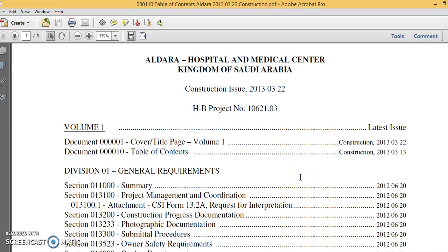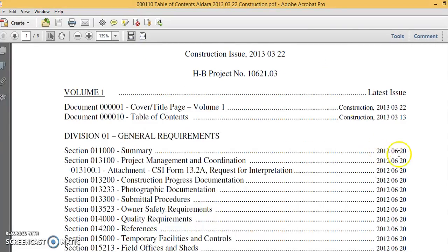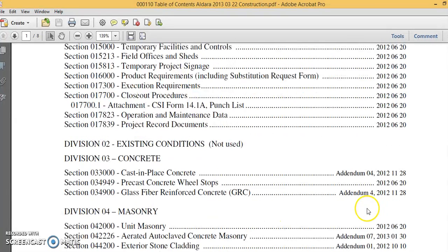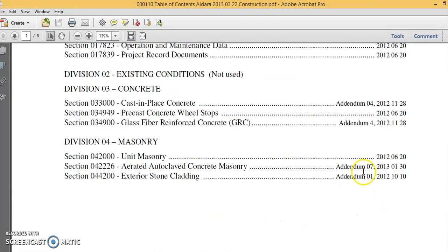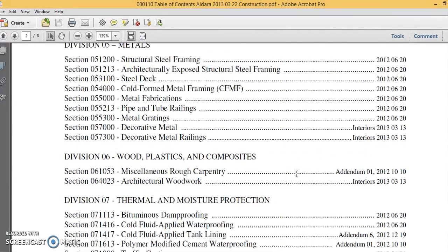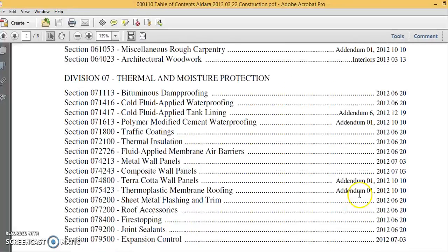Now I will show you examples of certain addendum in certain specification of projects we are working on. This is for educational purpose. This is Aldara Hospital. We are not going to show the specification, only the table of content. I will show you here section 03, there is addendum 04, section 03 also there is addendum, addendum 7, addendum 1, section 4 and so on. It's shown clearly. There are changes that have occurred here between the handing over of the bidding documents and the bidding award.